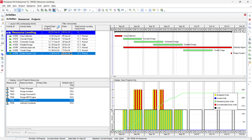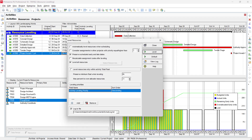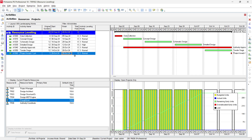The other option is to level resources without impacting the project completion date. Select 'Level resources only within activity total float' — only those activities with total float will have their start or finish dates adjusted. Click Level, and you can see the completion date remains 26 October while resources are leveled without any impact on project completion.